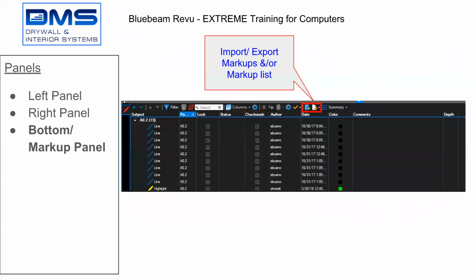You can also take all your markups. This works similar to, like I said, it takes your markups list here, and it can export it out into an Excel sheet. So if you're working with a document, let's say you're counting how many windows, or if you're doing lineal foot takeoff, you can take off a project, meaning highlight somewhere that will give you a measurement of how many lineal feet of wall there is, and you can export that into Excel if you wanted to send that particular takeoff there.